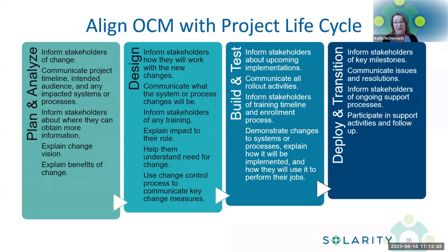This is where you can bring in that sponsor, where you can give them the tools or the processes to put in place to ensure that the change is still being reinforced, or that transition over, if it's transitioning to a different department or to maintenance and operation. Having that part of your transition plan, that in 2 months you need to measure this and ensure that it is still being effective in this way.